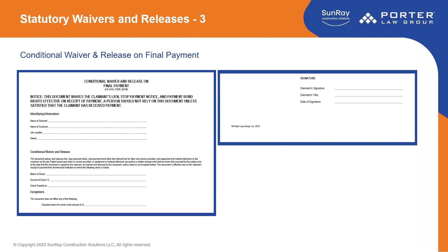It's not required in the statute that these releases have to be notarized. If someone asks you to notarize, tell them it's not required by law. That said, there are some things on which you want to cooperate with the other side. You should really have someone in your office who is a notary — it's easy to get a notary license and they're handy to have. But if someone insists, tell them it's not required by law, and if you want to get paid, go along with it.